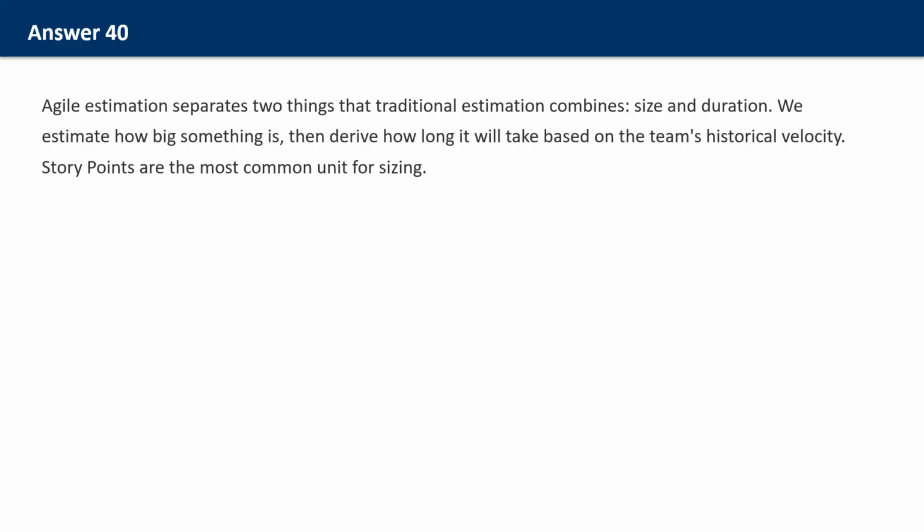Third, points separate estimation from commitment. Saying, this is a 5-point story doesn't mean this will take 5 days. It means this is roughly the same size as other 5-point stories we've done.